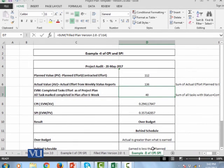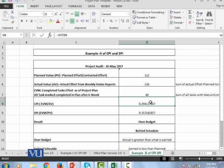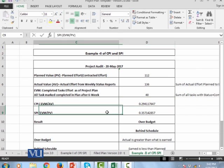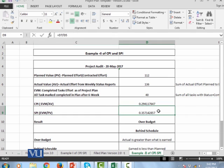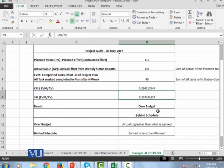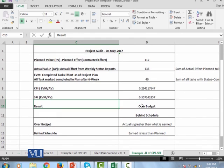Now the life is simple. CPI is just a divisor of EVM divided by AV, that is 0.29. This means that we are over budget. And now look at SPI, that is 0.35. Now we are going behind schedule. This is a big situation which we have here. We are over budget and behind schedule.